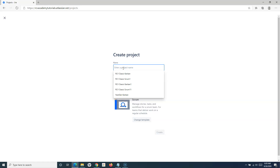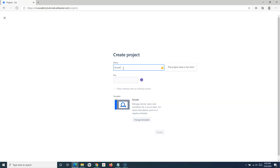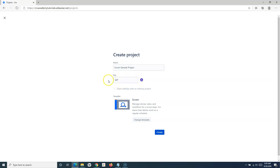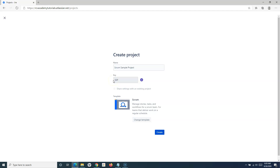Now you have to provide the name of the project. For example, I'll say 'Scrum Sample Project' — just providing any name there. You can see that the key for the project gets automatically assigned. If you want to change this key, you can change it here. The relevance of this key is that it gets associated with all the issues that you create, making it easy to search issues based on the key.